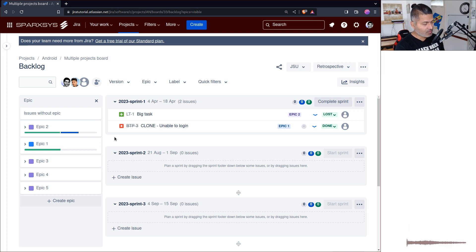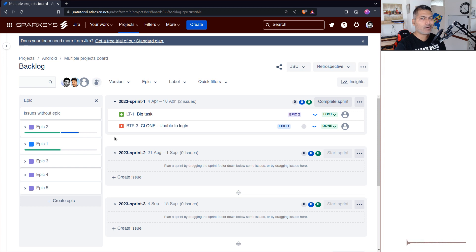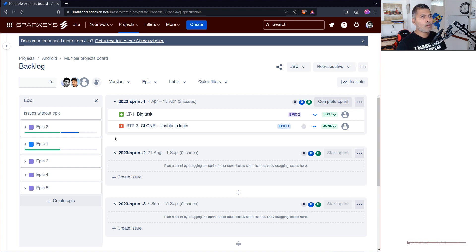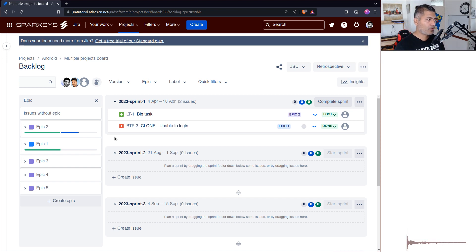When it comes to sprints, first of all there is no industry standard and no well-defined convention. It is more about what works for you. In this video I'll share what works well especially if you're using Jira, but also in general. If you want to keep things simple and make sure your sprints appear nicely when reporting, based on my experience you should name your sprints using this naming convention: yyyy-sprint-1.